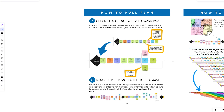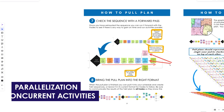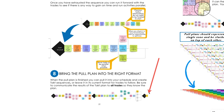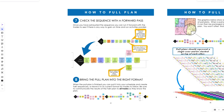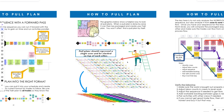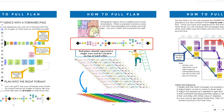On page 77 of the Tact Planning book, when you go backwards to start and check forward, you'll find what's called parallelization or concurrent activities — this is natural and optimizes your time. When done, you'll have a complete pull plan. Importantly, your pull plan should be for one single representative zone, not batched areas. A pull plan is simply one single sequence in a zone for a takt plan.